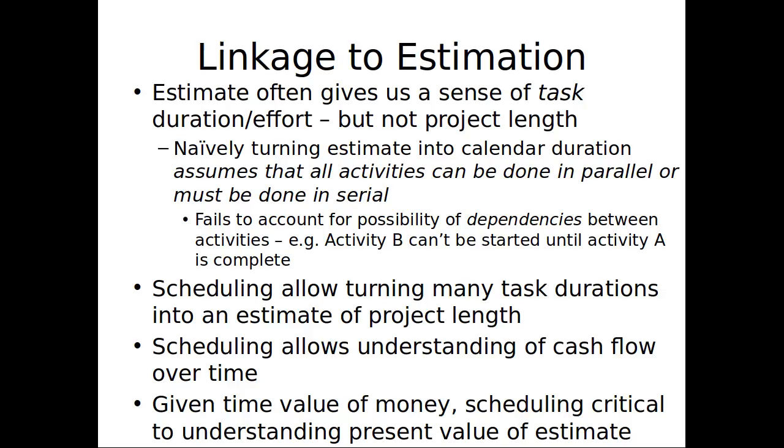Okay, so estimation gives us a sense of task duration and effort, but not project length. If we just assume naively we could total up the times for tasks, we're ignoring the fact that some can be done in parallel, some must be done in serial. Certain ones can't start till other ones have finished. So scheduling is a process that allows for turning many task durations into an estimate for the project length.